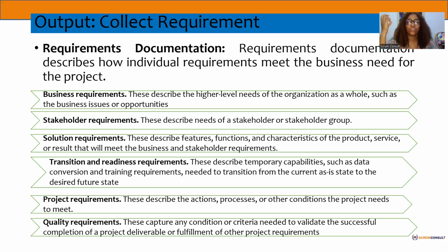You have your transition and readiness requirements. Transition requirements are temporary. They are the temporary capabilities that you need to move a project from the current stage to the future stage. For example, you want to migrate data from one point to the other. When you finish that data migration, that process ends. That's what we call the transition or readiness requirement.